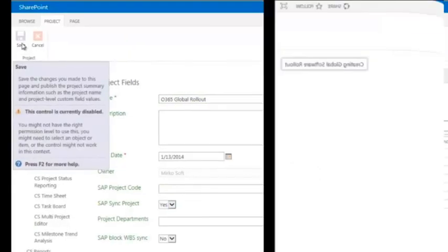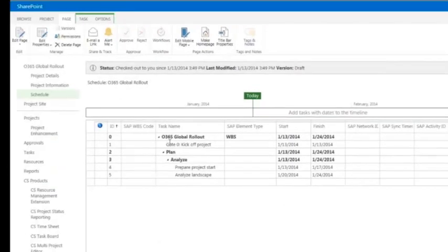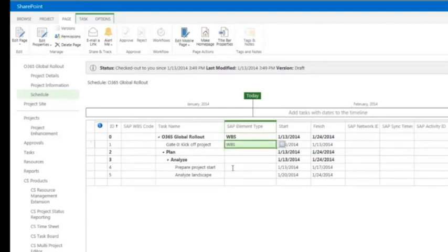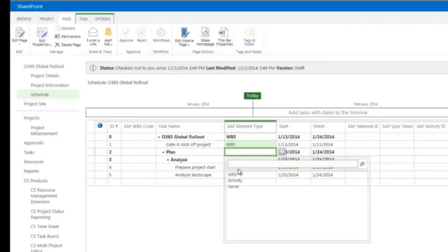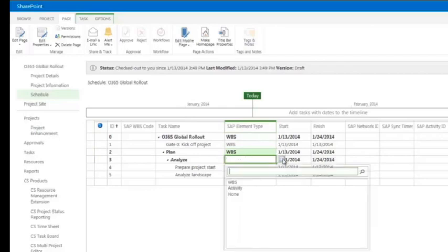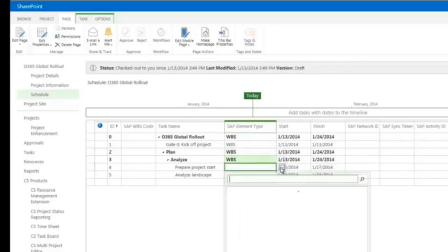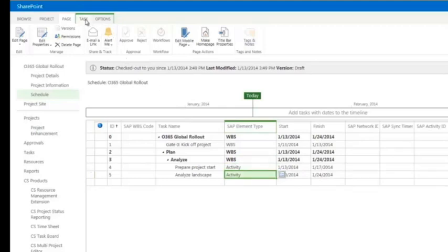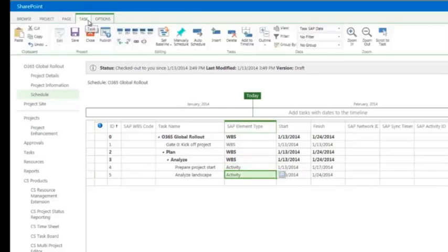In the next step, a project schedule is created automatically based on an enterprise template. The project manager defines which elements of the schedule shall be synchronized with SAP by defining the so-called SAP element types. The data transfer to SAP is triggered by publishing the project.